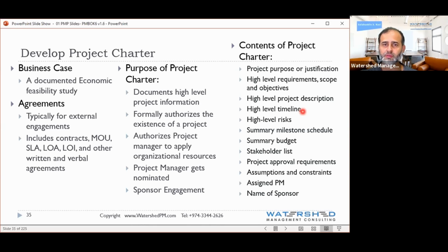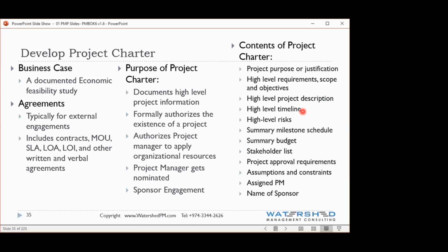And if you have a project with liquidated damages like penalties, then it's actually a constraint. Then it's not a constraint, sorry, it's a risk. And as part of your planning for risks, you'll have to factor this in, and you'll have to find a way to make sure this situation is always avoided. Okay.